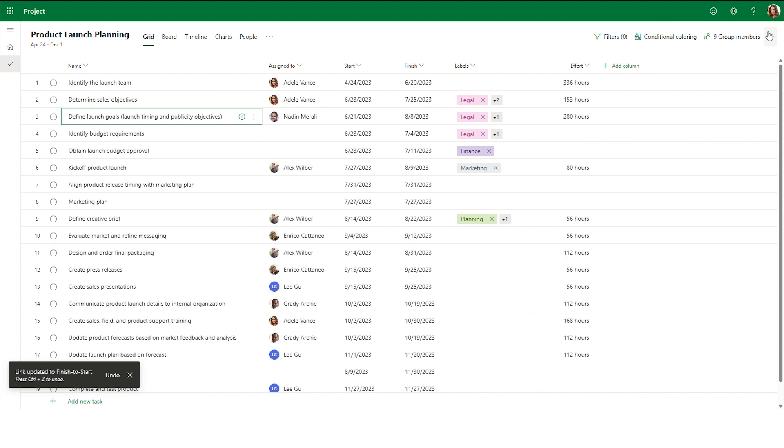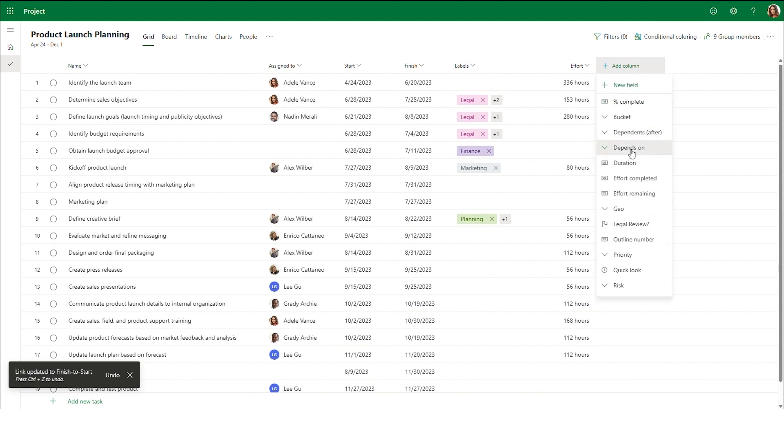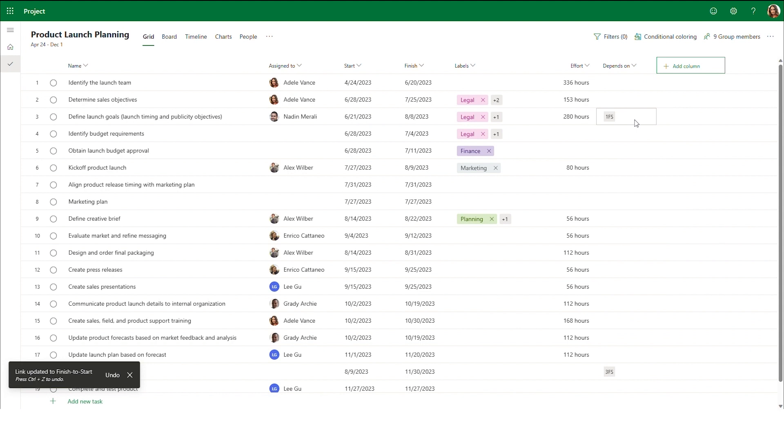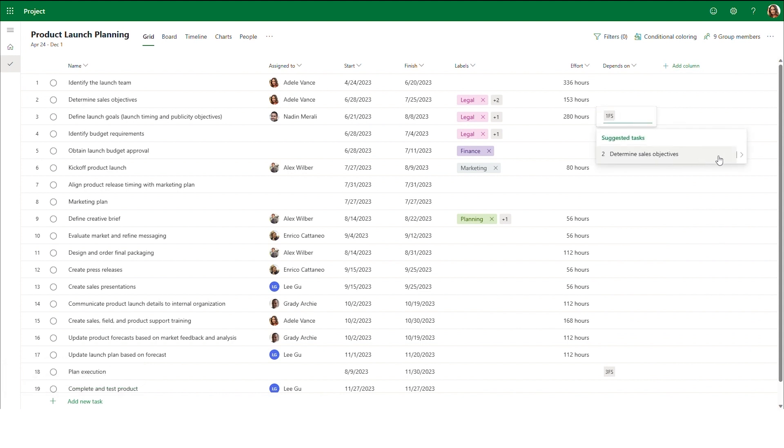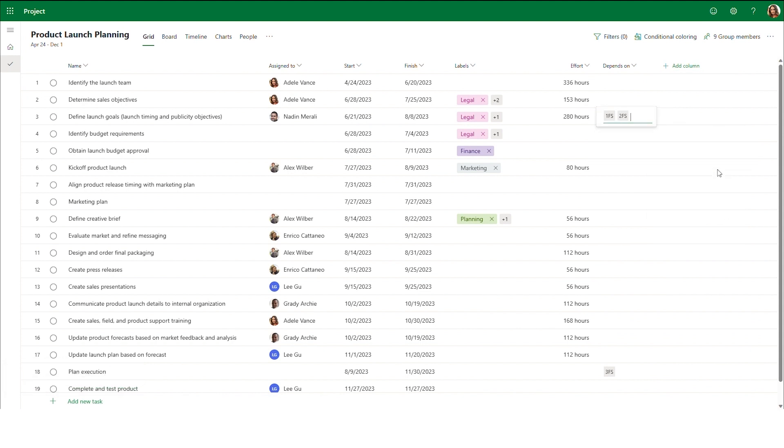You can also add a dependency column in the grid view and edit dependencies directly from the grid. Simply click on the field for the task that you'd like to edit and select the item that it depends on and its dependency type, just like in the task details.